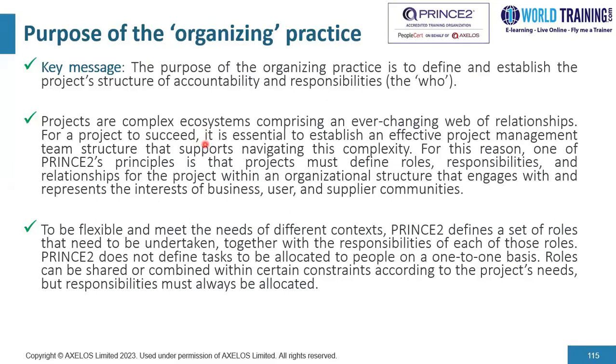this complexity. For this reason, one of the principles of PRINCE2 is that projects must define roles and responsibilities and relationships for the project within an organizational structure that engages with and represents the three key interests, namely the business, the user, and the supply communities.